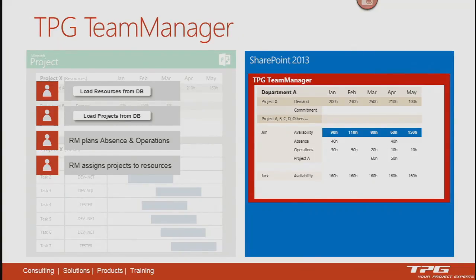And as you can see, what he wants to see is the remaining availability of his single people. Then he adds another project, and this is my example project here, and now it starts getting colored. So he can see, okay, in these time slices, somewhere I have problems because I've assigned too much, some months are over allocated, and other months I still have time which I can give away. Same for other people.